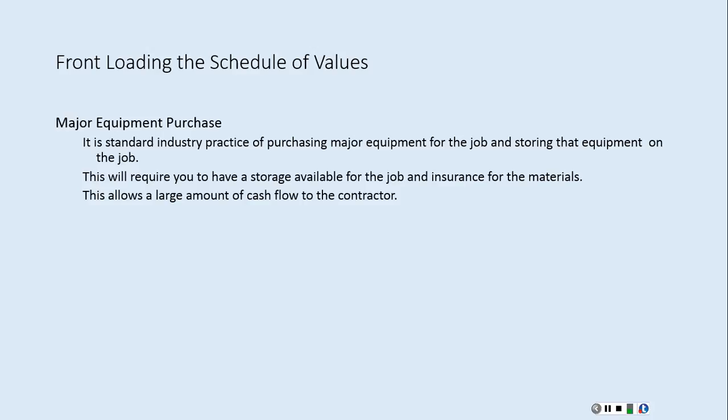When I started off a company, the day that we started the company, we signed a contract for just over $300,000 worth of work with one project. And when we did that, we started a company. Credit is a big deal with a company. So I talked the owner of the project into trusting us to pre-purchase all the equipment. As far as a mobilization fee, one of the things I put in there was a fee for all of the equipment on the project, because it helped our company out. I got to keep the profit on the equipment and use that to get our company moving and to use those monies wisely.